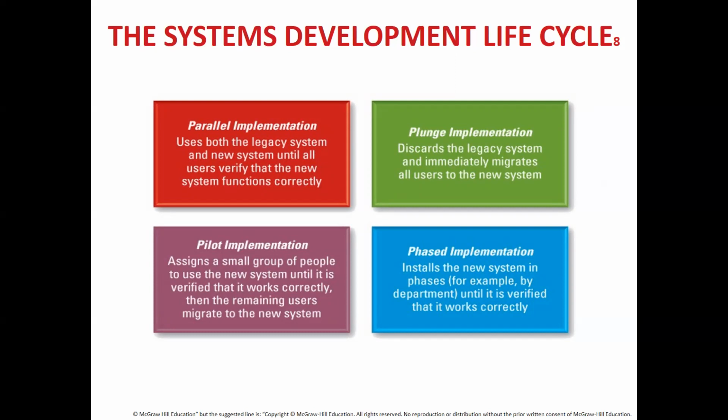Pilot implementation assigns a small group of people to use the new system until it is verified that it works correctly. Then the remaining users migrate to the new system. Now, pilot is generally just like you have a group of people who would use the new system, okay, and unless and until they get fully and confidently verified that the new system works correctly, then the new system is actually being implemented in the organization.